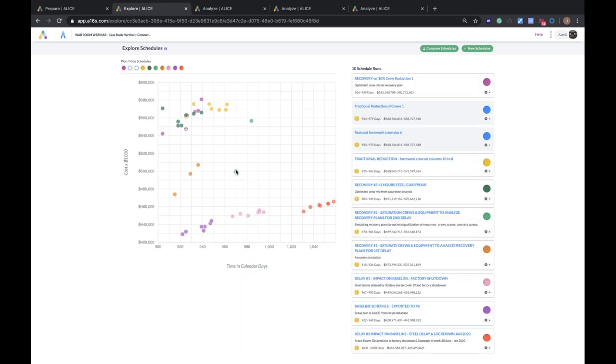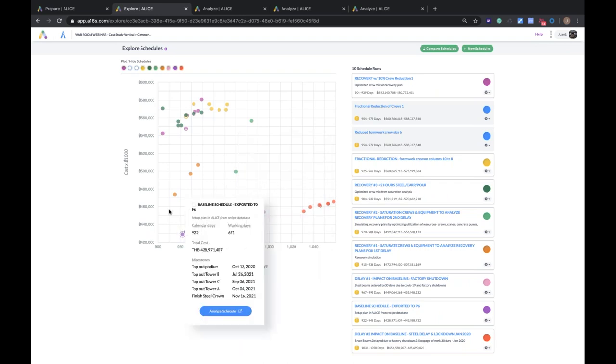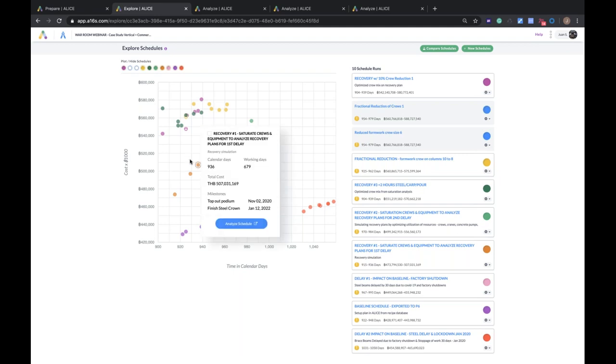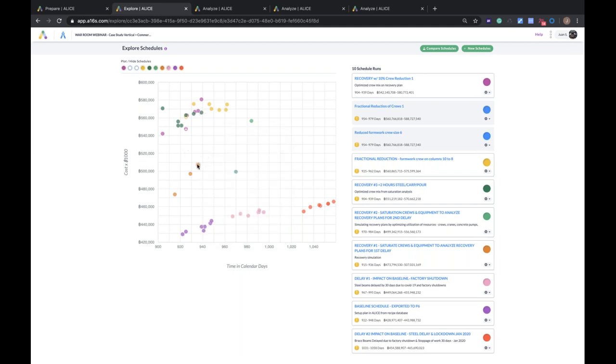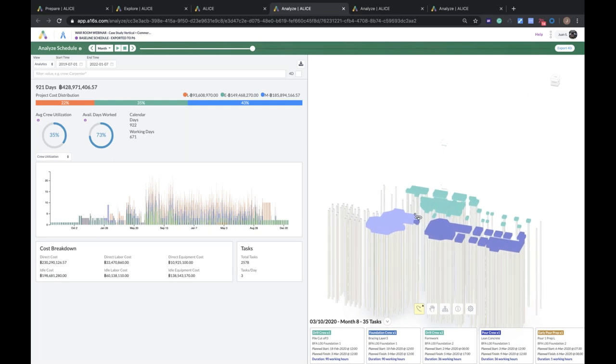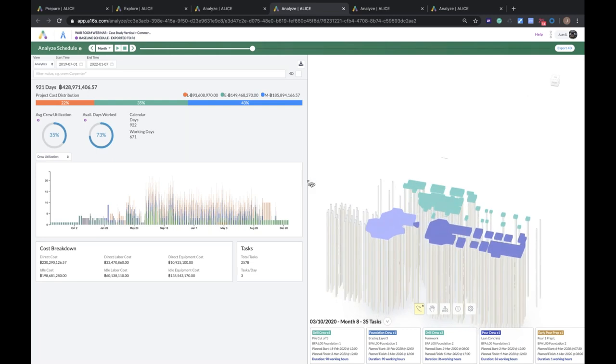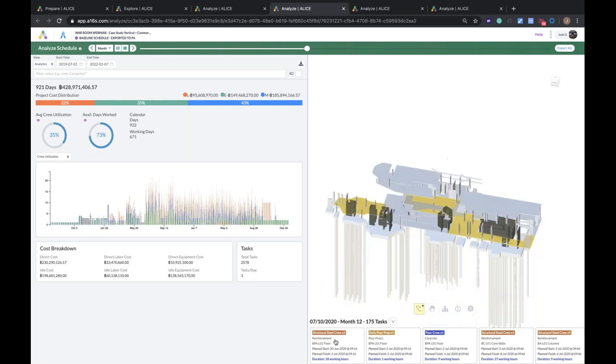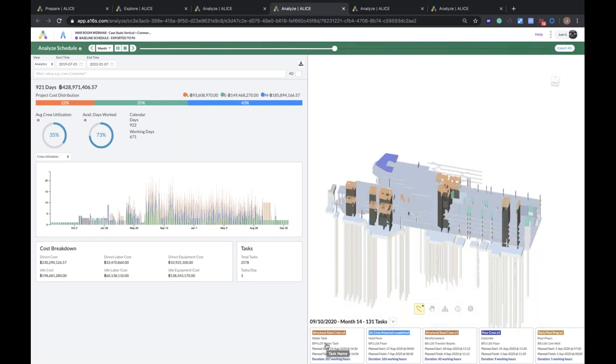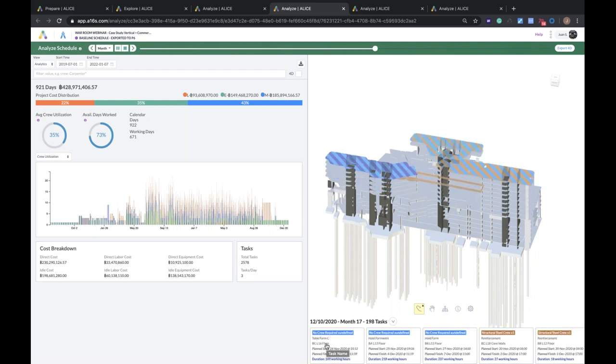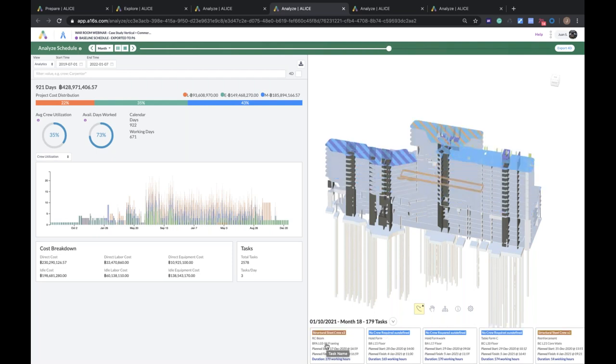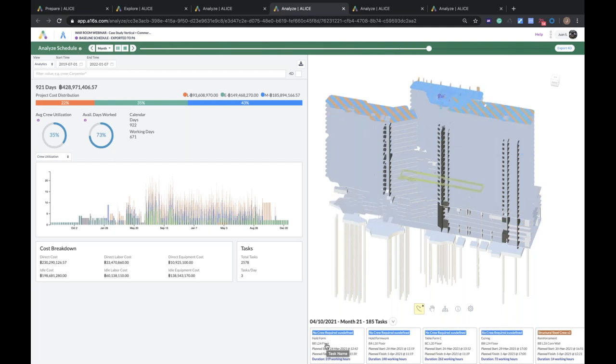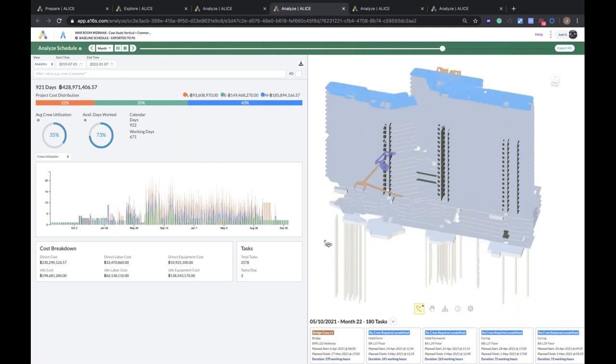So going back to those three pages in ALICE, I'm actually going to explain how each one works. This is the explore page, where you're exploring different schedules. You can quickly generate a new schedule by modifying your labor, your equipment, your materials, or your production rates. Each color represents a different schedule scenario. So in purple here, with the lowest cost, we see our baseline schedule. We see in pink, the first delay, and then the second delay. And up here, we see various options of different recovery plans that were explored. Now, each of these schedules can be analyzed. And it actually pops out to a 4D of your project.